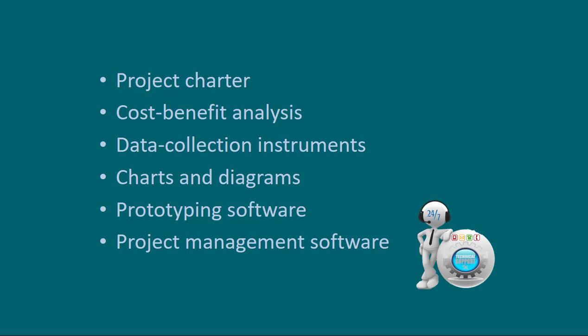The project charter is simply going to address a lot of things, like what are the objectives of the project, what's going to be achieved through this project, what's the scope, what's not in the scope, who are all your participants, how will the success be measured, what's the project timeline, what are the major project steps that are going to be involved. So there's a lot of questions, and it's very detailed. You can find examples of project charters out there on the internet.